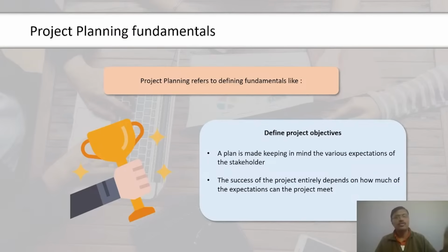Float of an activity can be calculated by 2 methods. However, the first step in critical path method is to identify the critical path of the network. Once the critical path is identified, follow the forward path to find early start and early finish for each activity. The float of the activities on the critical path is 0, so they represent the overall project duration. Use forward pass or backward pass to calculate the total activity time. Calculate late finish and late start using backward pass method. Note the total float formula before you start for the exam. In the next screen, let us look at forward pass and backward pass methods in detail.